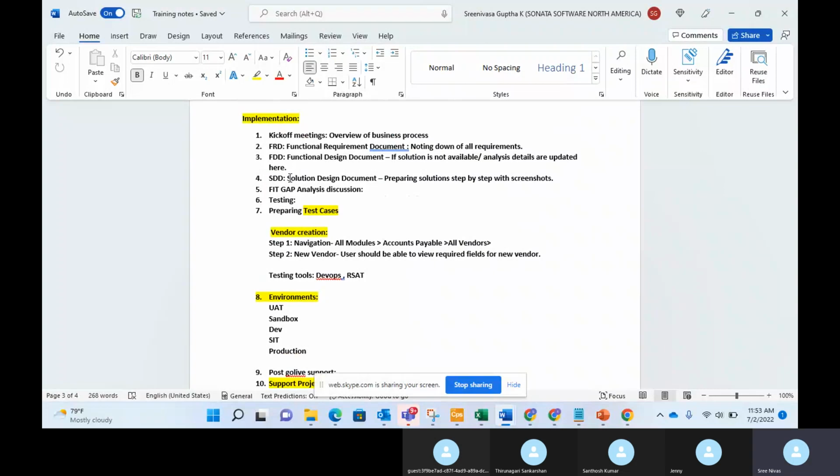Because for the last 20 years, let us say they are using SAP software, they cannot suddenly stop using SAP, right? That will not happen. So in parallel they'll be using SAP as well, but slowly over the next 1, 2, 3 years, they'll dump all the data from SAP to D365. And if they feel Dynamics is working and not throwing any error, then slowly they'll stop using SAP.